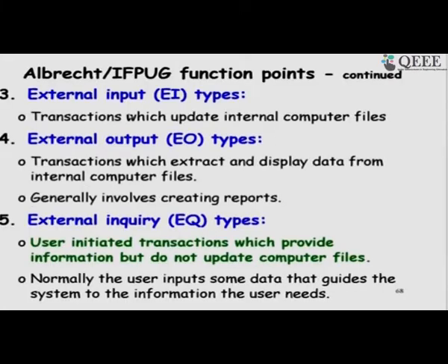External input updates the internal data. External output displays data from the internal data, maybe in some formatted form or a report, and inquiry are those which do not update the internal file. They just access the data internally and produce some result.